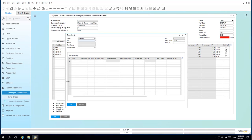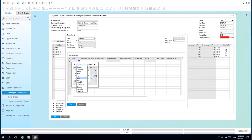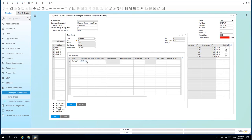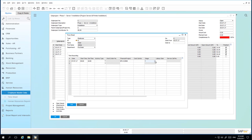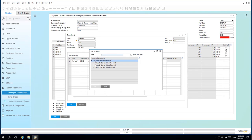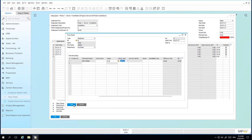Under Human Resources, we open up the timesheet window. We then select the employee and adjust the date to when the timesheet was effective and the date at which the work was performed. We enter the start time and then the end time. You can also define an activity type. We are then going to assign the financial project that is linked to this particular timesheet activity. You can also define the actual stage of the project with which this timesheet activity was associated. We are going to select the initial overall service and printer installation, show all stages, and select the planning stage ID. You can then select the labour type item from a billable perspective — in this case, the daily service labour charge. And now we are going to add this to the system.